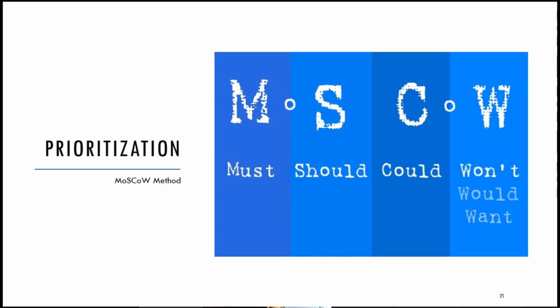It's a good method, and I worked in a project where it was used successfully when working with one department. When a project involves more than one department, I'm no big fan of this method because every department thinks their requirements are the most important. It has a high risk that you just get a lot of must requirements. And the question is, when everything is important, what should we start with?